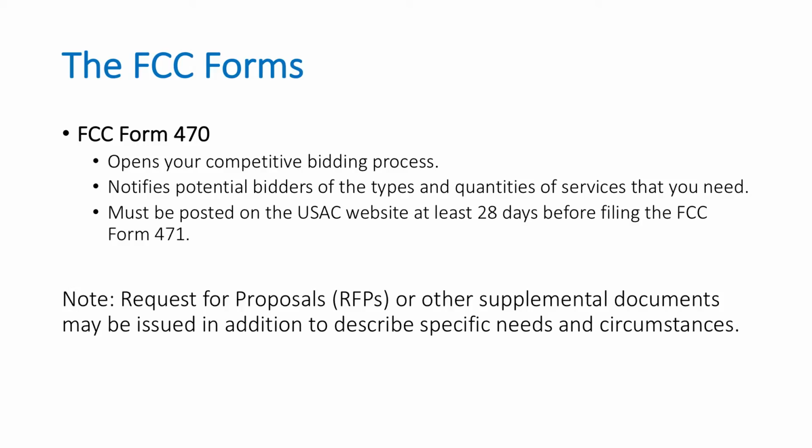So let's begin with the forms. The 470. This is, like I said before, this begins the E-rate process. This allows you to go out to announce what services you're going to go after. Now, in most cases, your 470, you will need to have a corresponding RFP to go with that, and you upload that RFP inside the Form 470, which posts both of them. Now, the 470 has to be posted for a minimum of 28 days before you can file your 471.